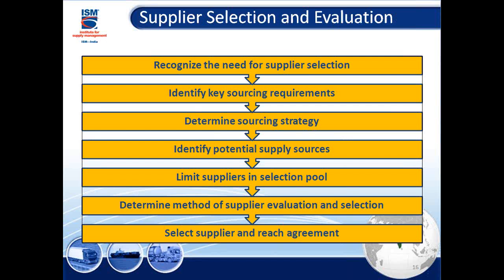Here I put the same thing down in a graphical way. Recognize the need for supplier selection. Identify the key sourcing requirements. Determine the sourcing strategies. Identify potential suppliers. Then I say there has to be a limit on suppliers in the selection pool also.